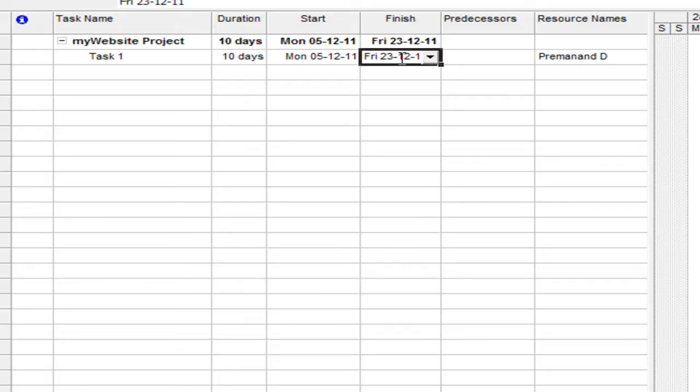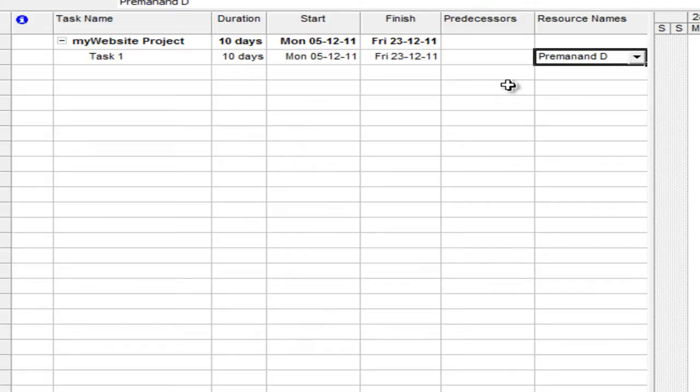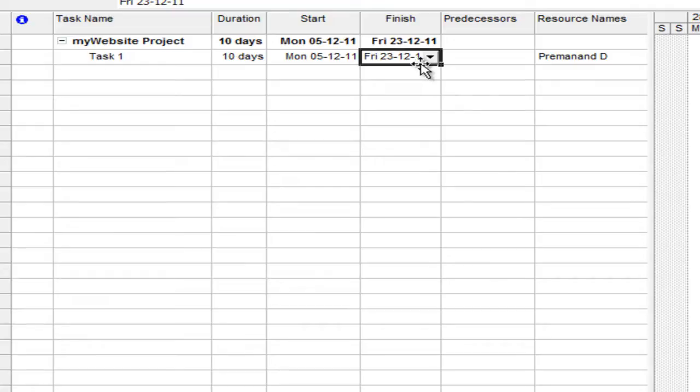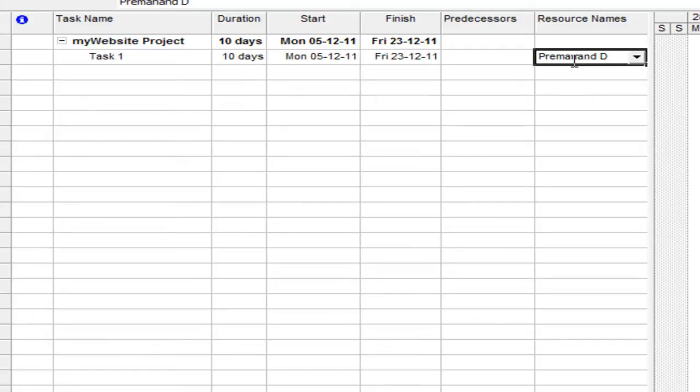Now I want to add another scenario to this. The resource allocated to this particular task is Premanand and he is taking an off, let's say he is taking a week off after Christmas. So let's see how we can manage that situation. If that is the case, instead of the task ending by 23rd of December, this will end by the end of December or the first week of January. Now how can I set up a week vacation for a particular team resource?